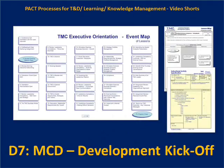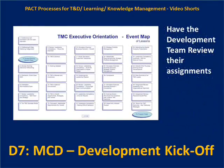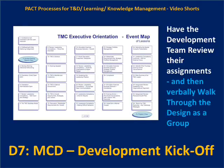One thing that I like to do is to have the development team review all of their assignments after they've been walked through all three levels of design as a group. Then I would like them to each look at their particular assignments and study that more closely — understand the instructional activities they're going to be responsible for, and how that fits within the lessons and within the event map. Then I like them to verbally walk through the design as a group, so the people responsible for lesson one talk out what they're going to do and what they're going to produce for everybody in the room or online, and then have the group handling the second lesson talk about their assignment, systematically walking through the event with each lesson and each instructional activity.